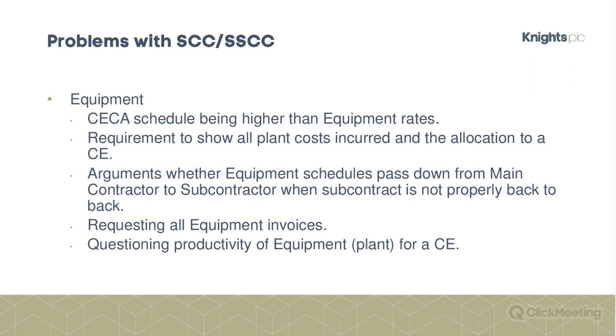So specifically, or particularly for, say, a compensation event under option A, you already have a piece of equipment on site. It has to be used for a compensation event. It's no good just being able to say, well, here's the cost of that piece of equipment. You also need to prove it, show presumably by documentary evidence, the period of time that piece of equipment was engaged upon the compensation event work as opposed to the lump sum price work.